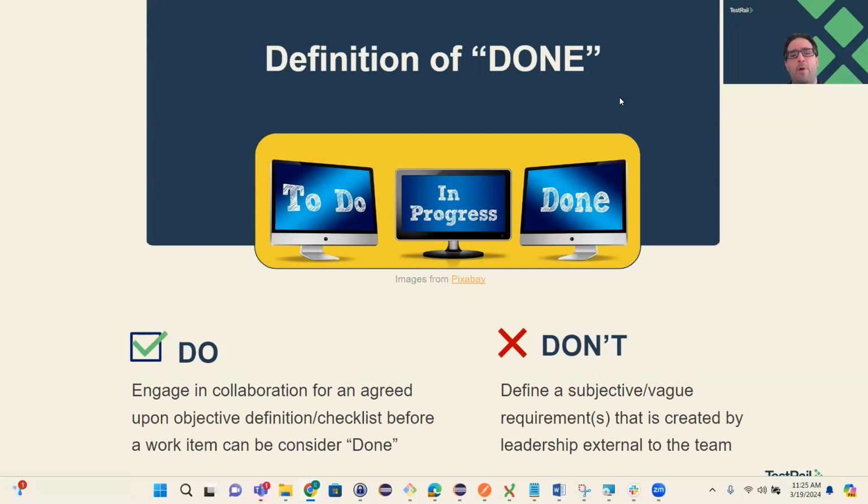What I would recommend avoiding, my don't category, is subjective or vague requirements. It hurts the team. It's even more confusing when we're working distributed. Maybe we're pushing work to a team in a different time zone, and the team that developed it is trying to do some acceptance, if you work in a product-focused role, or facilitating a test role to demo to somebody. A subjective requirement would be, the story is done when the user feels it's usable, or whenever we reach acceptable levels of usability.